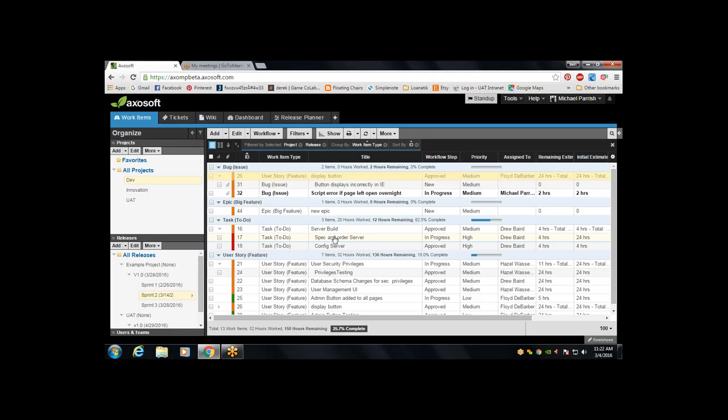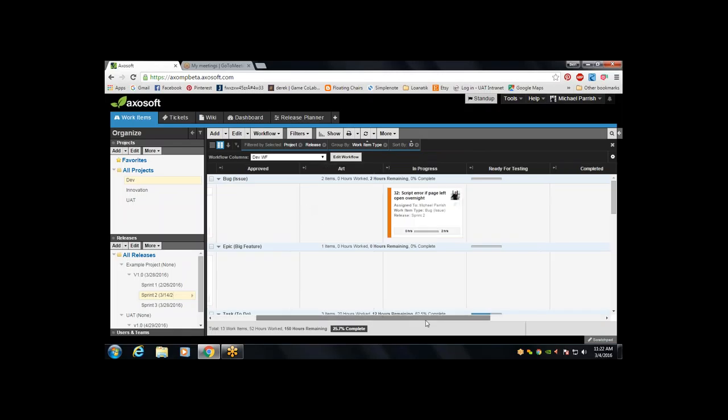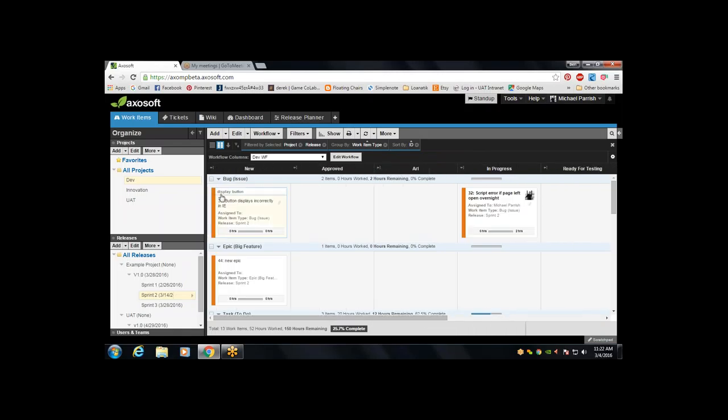I can only be big brother, but if I can task this out, I don't have to worry about all the intricate parts of this. I have the team done. But once the team's done, all they need to do is move in progress and approved to close. I can set up workflow. Switch back over to Kanban. I can set up workflow so that when I move all of my work and all of these sub-items into completed, it will drag the parent user story to completed.